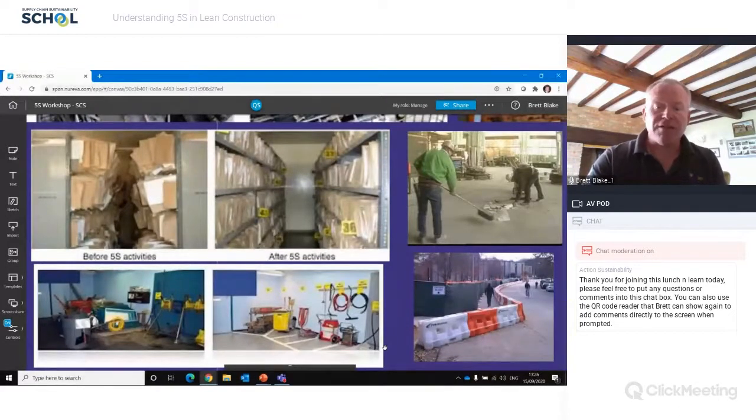To take this one step further, we could actually put a nameplate there as well that identifies what the piece of equipment is that should be there, and maybe have an opportunity to put a space on where if somebody takes that material or equipment away, they mark on who's taking it. So if we need that equipment in the future and it isn't in the space, we know who to go to get it back.